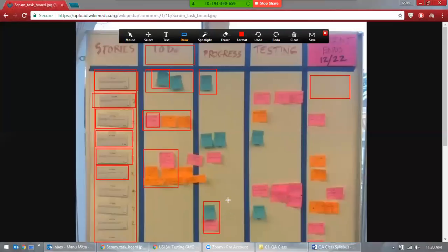So here you see this, right? 2 to 3 sticky notes. That means development is completed, the tester is working on it, the tester completed. If there are more testers, then you have more sticky notes. And once it's progressed, you put this in testing, the same thing again. Like if you have 2 days for testing, just put in 2, strike it to 1, and then it says complete.